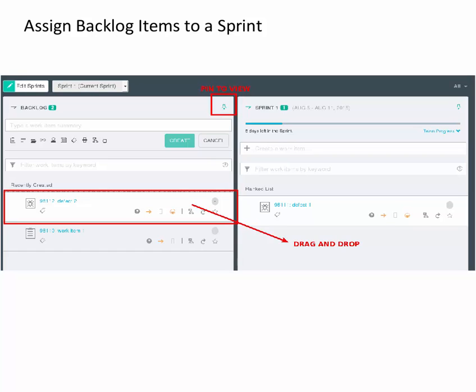While you plan a sprint, review the work items in the backlog and sprint planning views to rank the work items. Rank work items and assign story points to them by dragging work items into position. In the sprint planning view, you can plan sprints by dragging work items between the sprint lanes. To reassign work items, drag them across to the new lane.